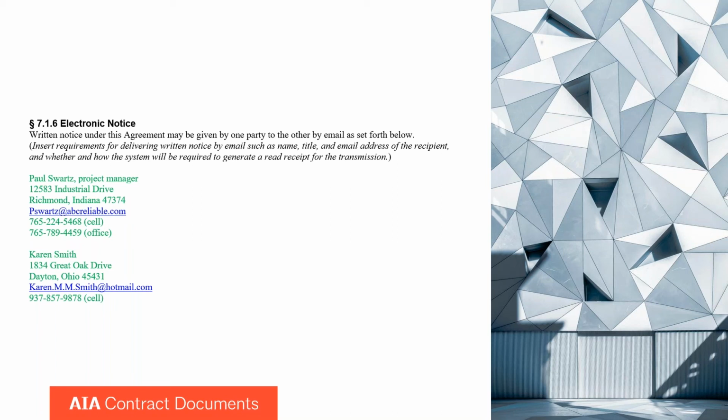If you have a problem, a dispute, as Marika mentioned, you could use electronic notice as the means for conveying this information. Traditionally, all these things used to be delivered by mail and certified mail and so on. And so to the extent that the laws in your jurisdiction allow for this, it's useful to list it and identify how you would like to communicate with the other party.